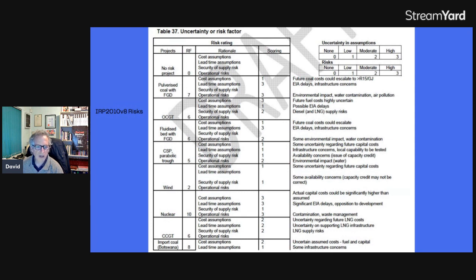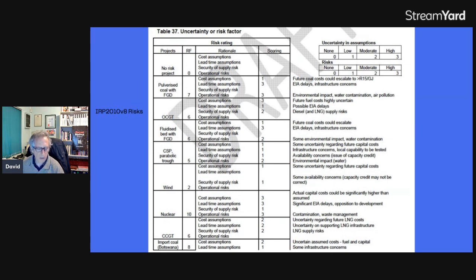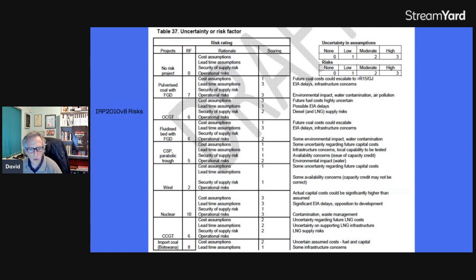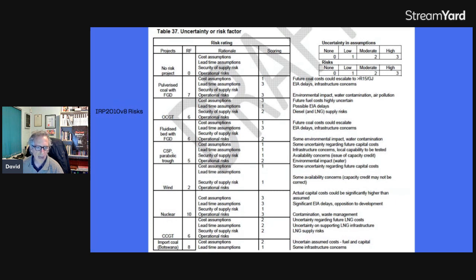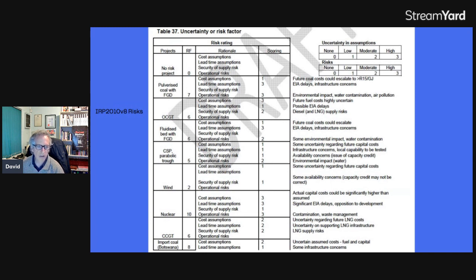So now if we look at the highest, the highest number is nuclear. So nuclear power is the most risky. According to the IRP 2010, where they were thinking about installing more nuclear in South Africa, it got a 10 out of 12. The maximum score is 12, because if you have four 3s, that's 12. So nuclear gets 10 out of 12, which means nuclear is very, very risky.